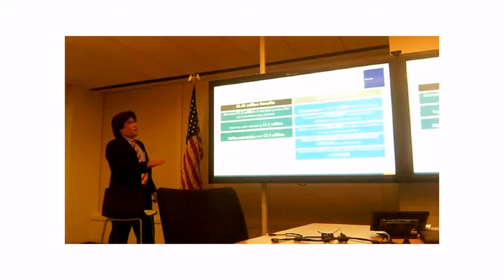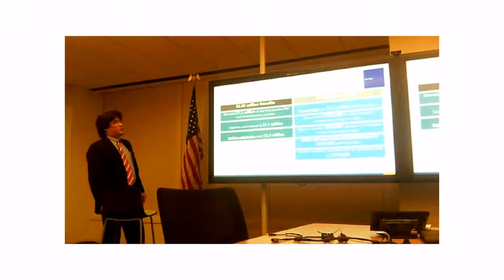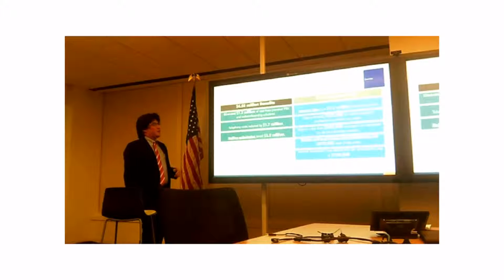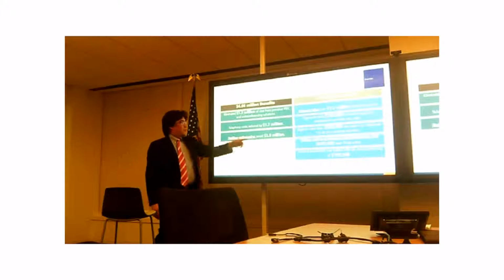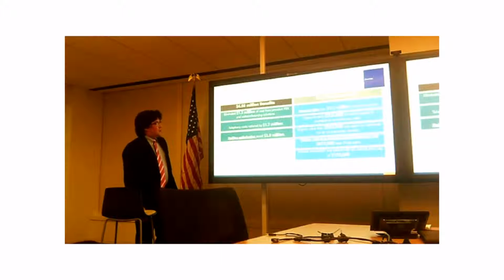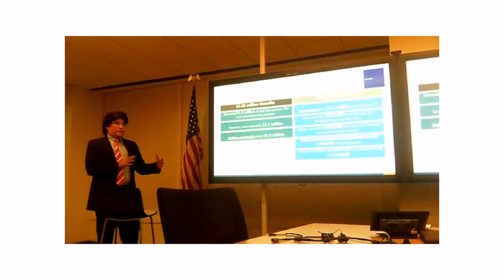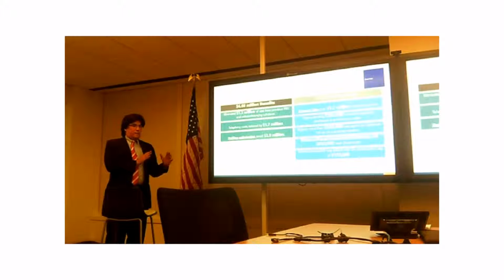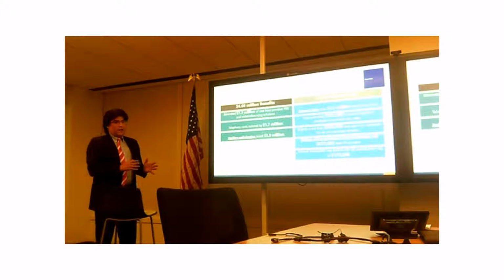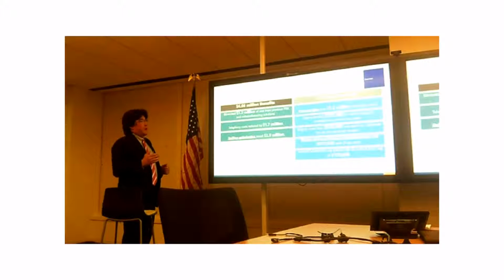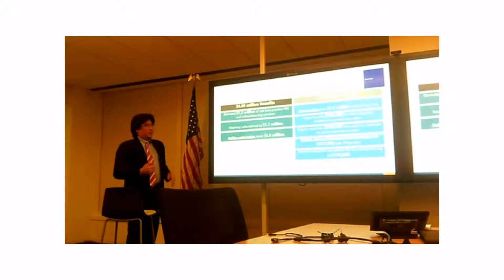So I'm not going to get too into this slide. I just wanted to show you the breakdown of the benefits and the cost. You notice that staffing optimization was at 3.9 million. That basically means if time has been freed up and your staff no longer has to do X function, they can be allocated to another function, which allows you to save about 3.9 million, among other things. Contracting costs are also reduced, and that's what's taken into account here.